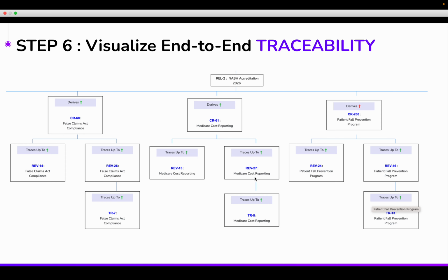And in the database, as you make these connections, the system is able to remember what those connections are. You do get these benefits by virtue of connecting, which is when a requirement gets modified, it starts showing up as a suspect, and the suspect basically indicates a change that has been made to a requirement or an activity that has not been approved by all the related authorities, right? And that's how you start visualizing. Ideally, you want everything to be green, but if you see a small red arrow out there, that means that activity has a change in the system and the change has not been approved by everybody, right?